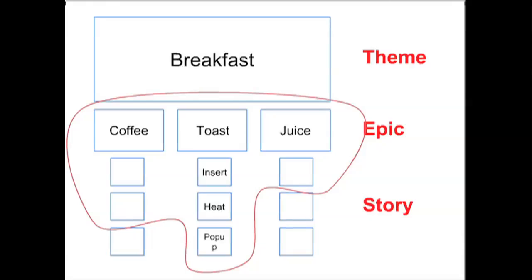And just one other point about how many stories we have in a sprint. We typically have sprints or iterations that are 2 weeks long. I prefer to have about 4 to 8 stories. People do various numbers. They do 1 to 2. They could do 16, 20. It's really up to the team and organization. I like the 4 to 8 because it's just enough for the team to have ones they can start checking off and accomplish. So if they can only get up to 6 or 7, then they still did 6 or 7 out of the 8.